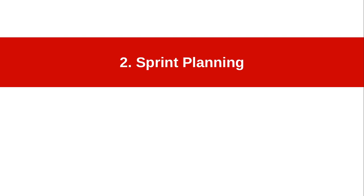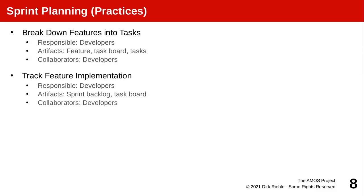So sprint planning - we already know that we have a sprint planning meeting in which the team commits to the sprint backlog, the features to be done in the upcoming sprint. And it is the result of the sprint planning meeting what makes it into that sprint backlog. And the next follow-on step then for software developers is to pick each of these features one after another or in parallel, and implement them.